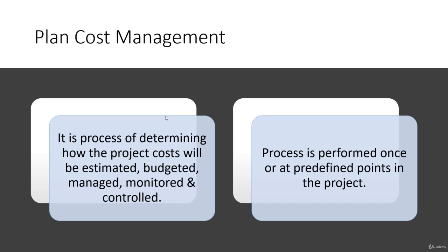As mentioned in the previous sections, for human resource management in terms of costing, we will first estimate the entire work in terms of hours, then convert that into a dollar amount. Usually this planning happens once or at predefined points in the project. And as we are talking about the funding, it is happening at the initial stages of the project, very initial in fact. This planning is really vital for the project, because at times you will have to acquire resources, hire consultants, or use some tool for a specified period of time.